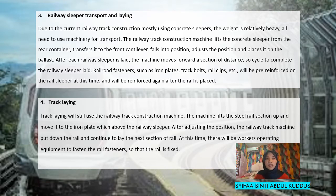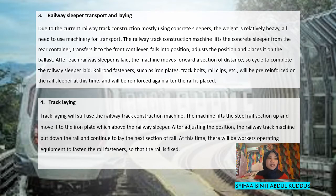The fourth step is track laying, which again uses the railway track construction machine. The machine lifts the steel rail section up and moves it to the iron plate above the railway sleeper. After adjusting the position, the machine puts down the rail and continues to lay the next section. At this time, workers operate equipment to fasten the rail fasteners so that the rail is fixed.